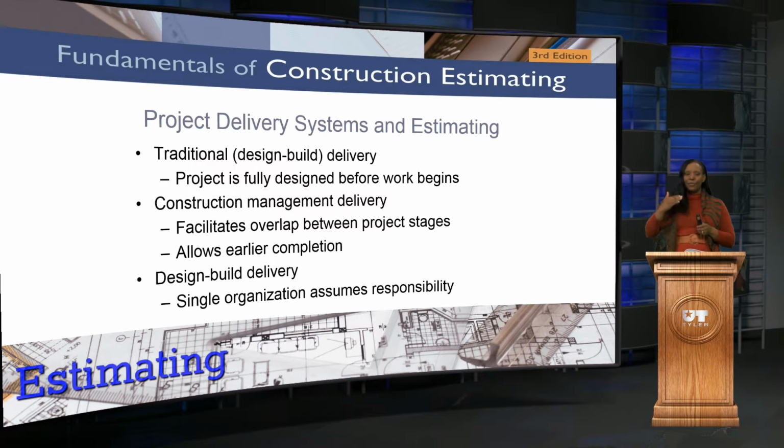You don't have to go through so much of the communication. It doesn't have to go to the estimator, to architect, to contractor. There's just one place where you can go to get answers, and that's really helpful. Usually there's going to be one lump sum, and of course that all depends upon your contract type. But it is a single organization that assumes responsibility.